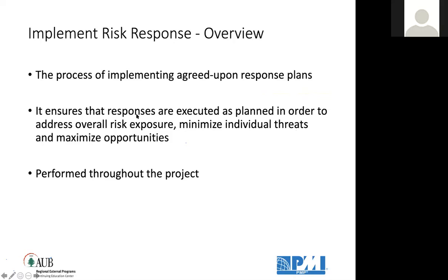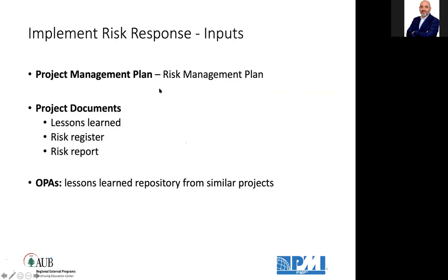So implementing these agreed upon response strategies and ensuring those responses are executed as planned, this is the implement risk response process. And it is performed throughout the project where and when needed, proactively and reactively. You need the risk management plan, you need the risk register mainly, and the risk report, and lessons learned from similar projects.